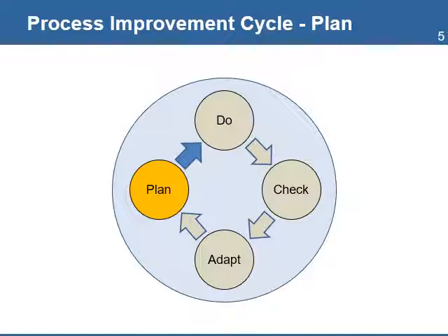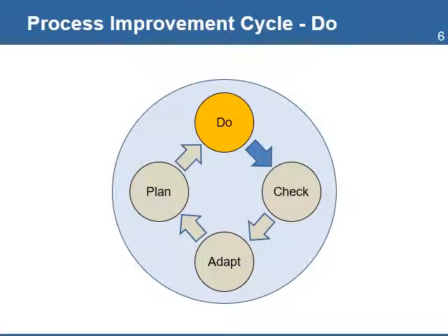All project processes need a plan. You will need to identify on each process the level of detail required, the information you will need to develop the plans, the people that will use the plans, and the level of effort needed to develop the plans. This will include the use of tools and techniques to develop each plan. For example, the development of the schedule management plan that will be used to monitor the time to complete the project. The second step, once the plans have been approved, is to execute the plans.